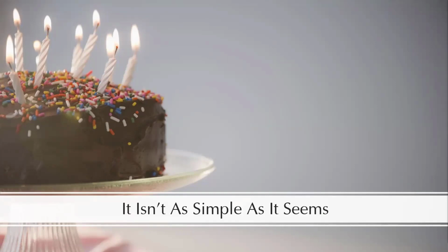And then of course you get your frosting made, you frost the cake, you find a serving platter and a cake server. Did you get the plates and spoons? Do you have the candles? So for this, we'll call baking a cake a project. You've got segments. So you've got ingredients, bake cake, make frosting, prepare final cake, and serve. And so those are kind of ways to break up the project and start figuring out where the tasks fit in order to make this work.